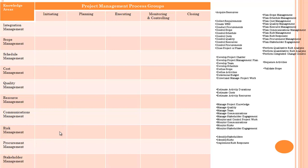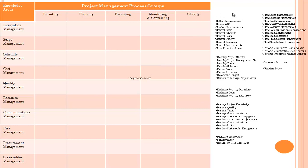Now we will try to arrange all these 49 processes in their process group and knowledge areas. First is acquire resource. Resource means it will go to resource management knowledge area, and acquire means something is happening, so it will go in executing. Acquire resource belongs to process group executing and knowledge area resource management.